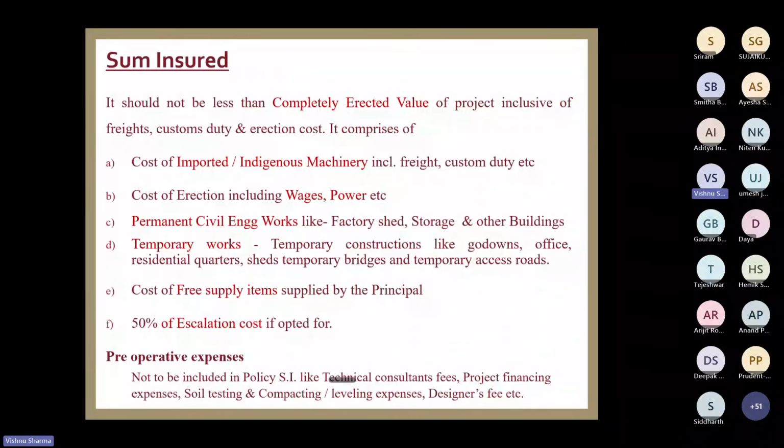It is common sense. The principal has to take a marine transit policy from the suppliers till the project site, if he is directly ordering those materials from the OEM or any supplier of that material or machine. That transit insurance has to be arranged. So the contractual condition should be amended, with some good concealed damage period.